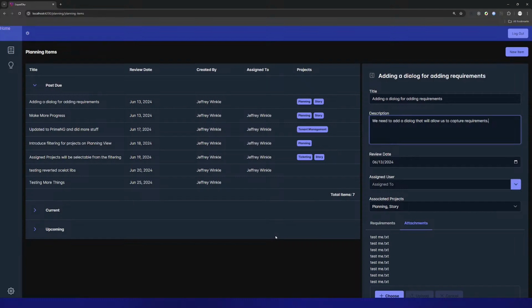I've also not seen a team have more than 1, 3, 5, 8, 13. We've used 1, 2, 3. No, half, 1, 2, 3, 5, 8, 13, 20. And 100 is we have no idea. 20 is okay, this is extremely hard and there's a lot of unknown. Yeah, more is only better to a certain degree. 200 points is probably not better than 50. Use 21 all the time and then we split, which just becomes an epic and split into small stories.